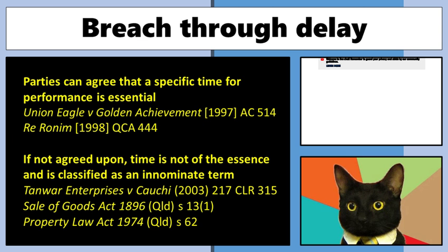All right, and it turns out a property settlement that says the property is to be settled at 5 p.m. on Friday. What happens if you rock up at 10 past 5? Yeah, in certain situations, they can say, and it's been stipulated, time is of the essence. This is a phrase, you will see this in contracts, time is of the essence. What that is saying, we are making time a contractual condition of this contract.